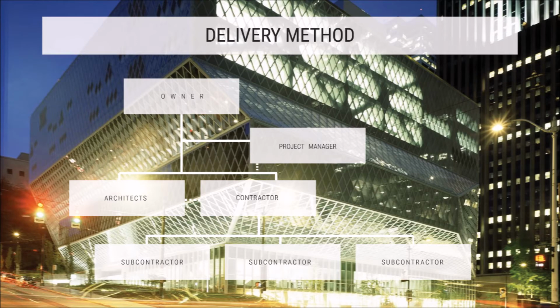The delivery method chosen for the project was a CMGC at-risk method. This method allowed Hoffman Construction to be brought onto the project earlier in the process. As project manager, Seneca Group would work between the library board and the contractor and architects.